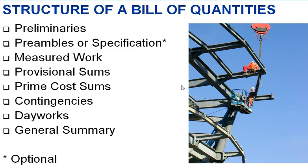The general structure of a Bill of Quantities is as follows. We have the preliminary items at the very front of the BOQ. Preliminaries relate to contract conditions, health and safety, welfare, insurances, supervision, and all other items which have a cost in the construction works but cannot be actually built into the project — for example, we need skips for the removal of rubbish, so there's a provision for the pricing of waste disposal within the preliminary section. We also need to ensure that we have the correct insurances in place, which will also be priced in the preliminaries.